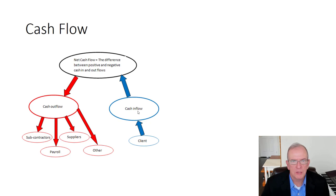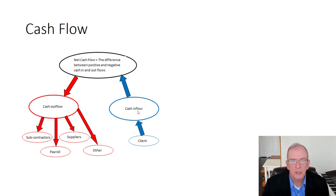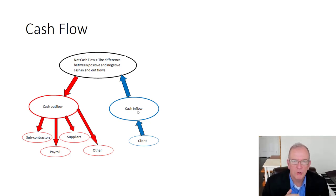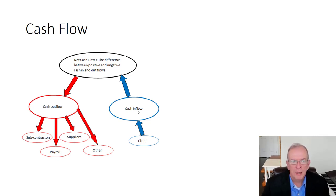In construction, you could have very profitable projects that could make you a lot of money, but if during that project you run into a condition where you don't have the capital — the liquidity — to pay, or your line of credit is maxed out, you're stuck. Subcontractors, suppliers, and employees all want to be paid when they want to be paid.